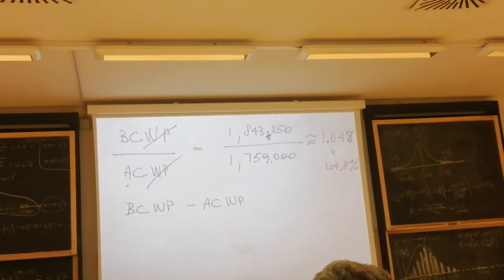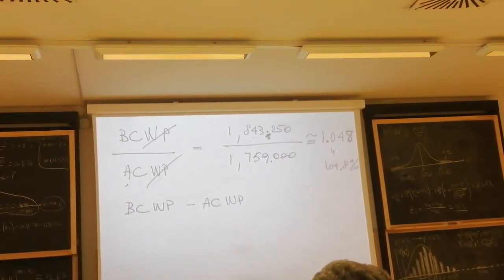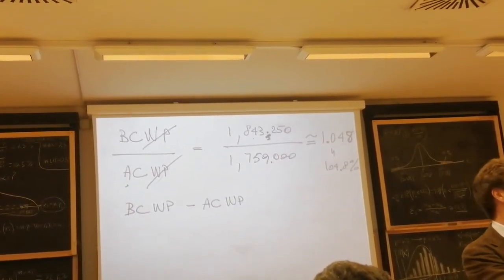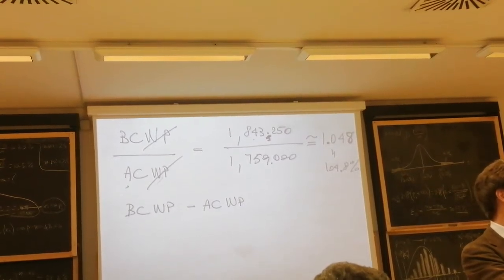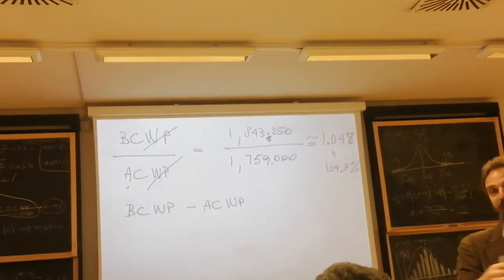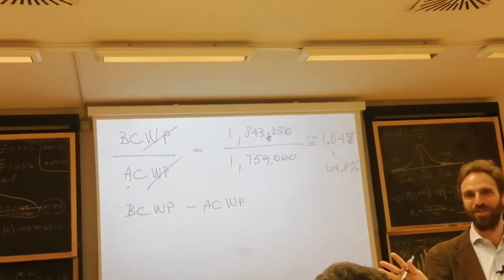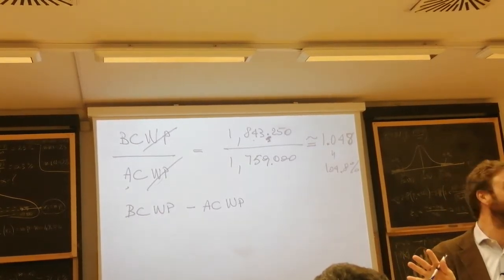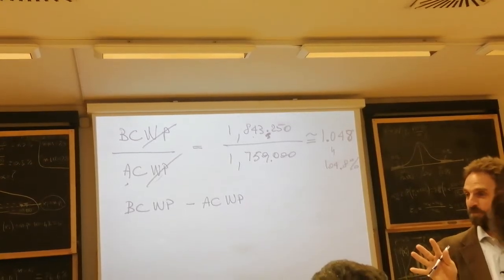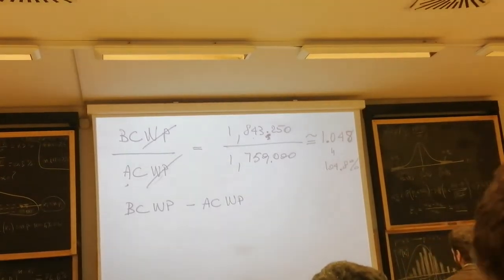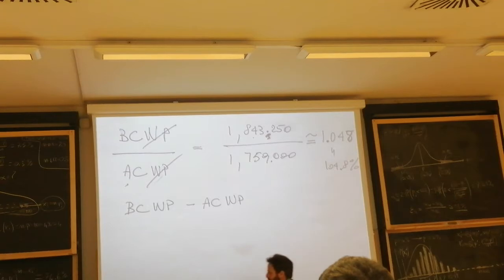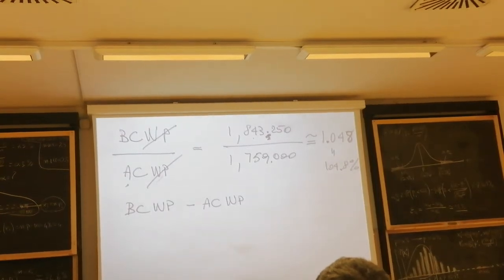That's why we need the earned value. Otherwise, if you compare the cost actually incurred with the budget, you would have work performed versus work scheduled, which is different, and you couldn't compare them.